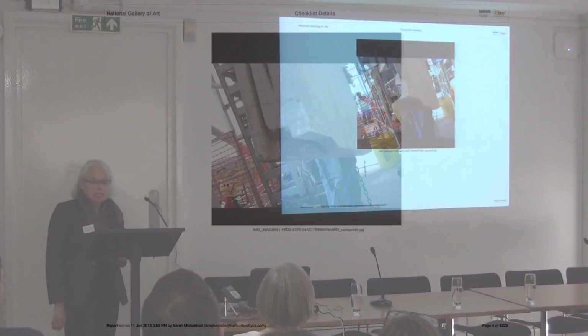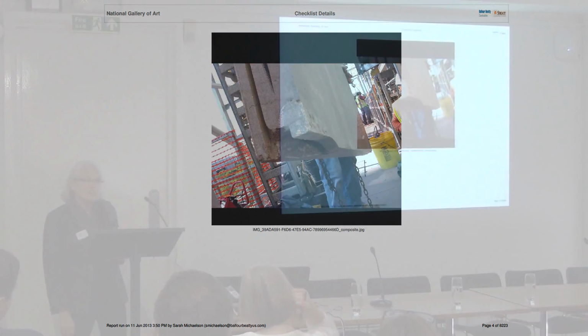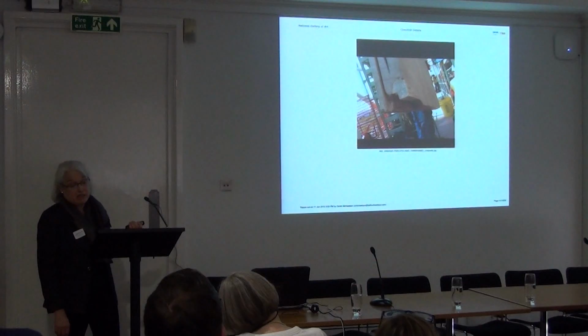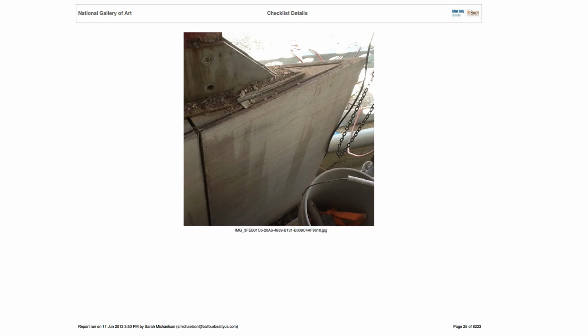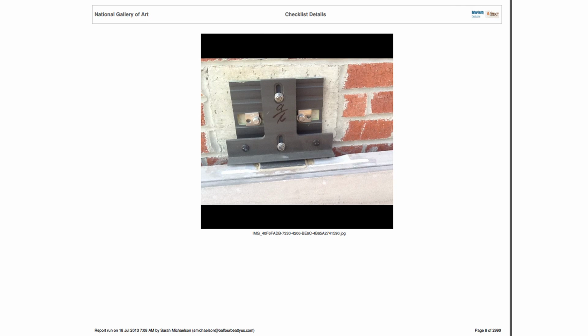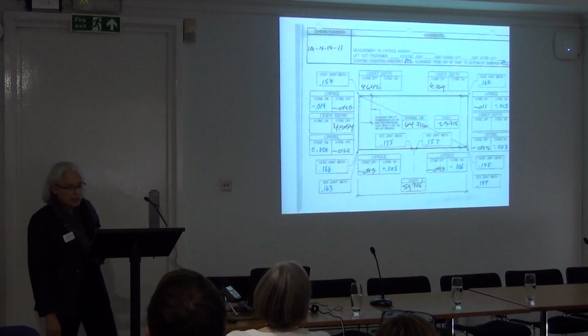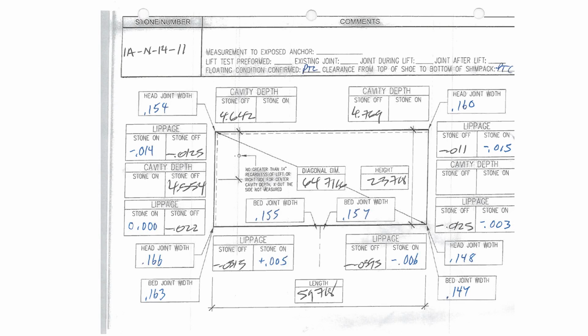One of these, the Vela system, was specifically designed to photograph, inventory, measure, and track each of the thousands of stones that were removed, cleaned, and eventually restored to the building. Here you see a few of the thousands of stone and anchor images. Not great works of art, but important as building records for the future. This is an inventory form where every stone was measured and recorded.